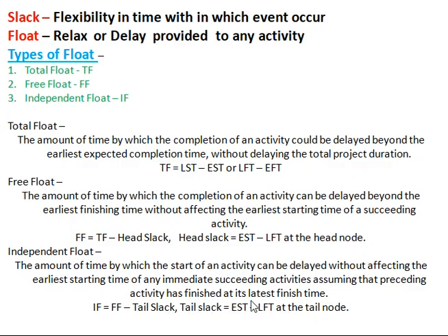There is also a formula for it. If in the examination they ask for independent float, we need to calculate free float, which means we need to calculate total float as well. We need to calculate all these things if we want to calculate an independent float.